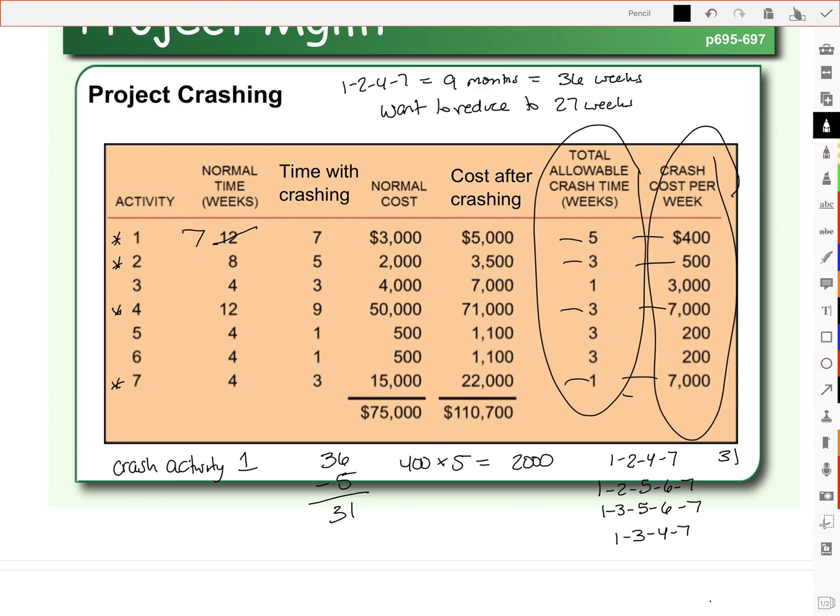Well, 1, 2, 5, 6, 7, if you recall, took 8 months. So, 32 weeks. And activity 1 has just been reduced by 5 months. So that's 32 minus 5. And it is now 27.